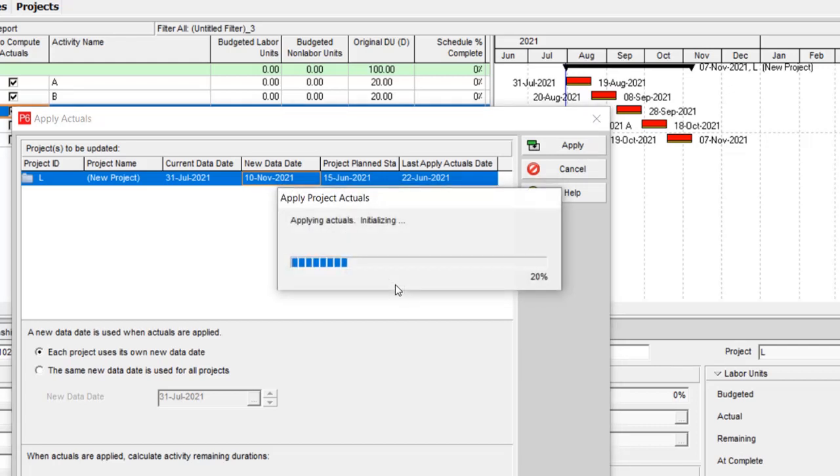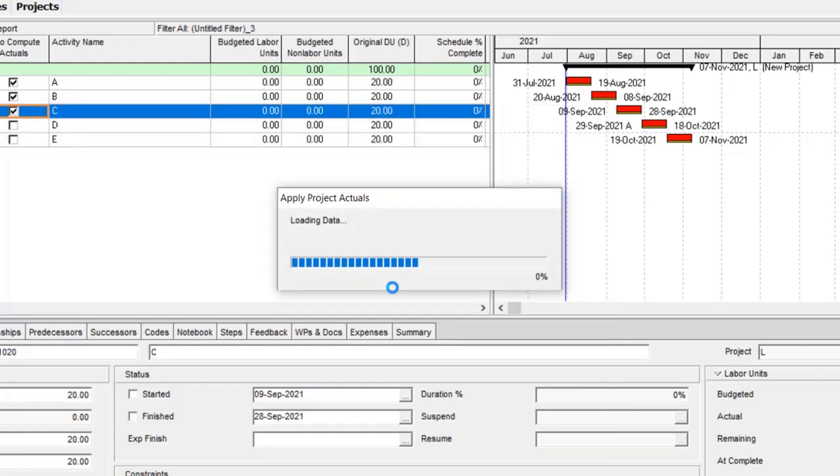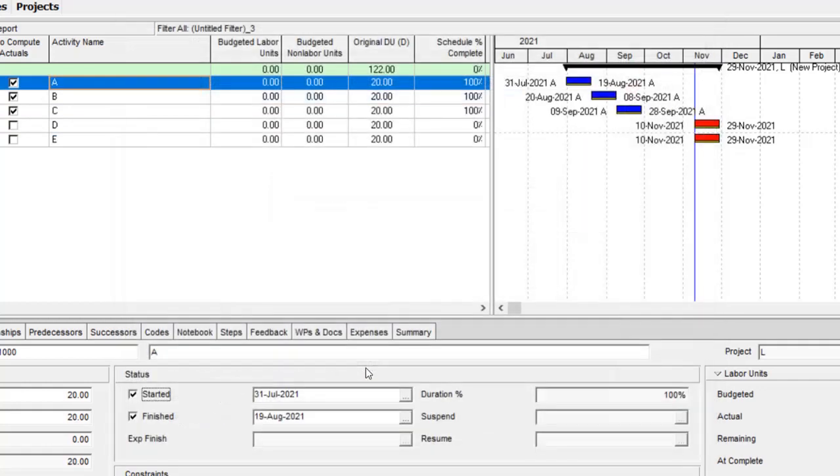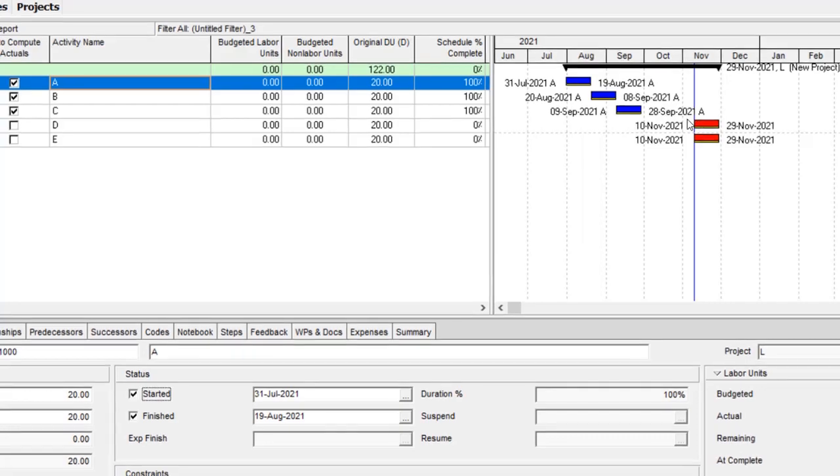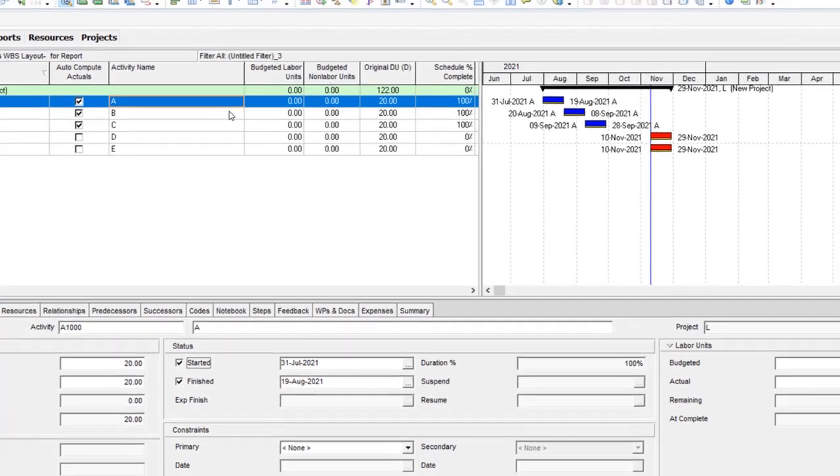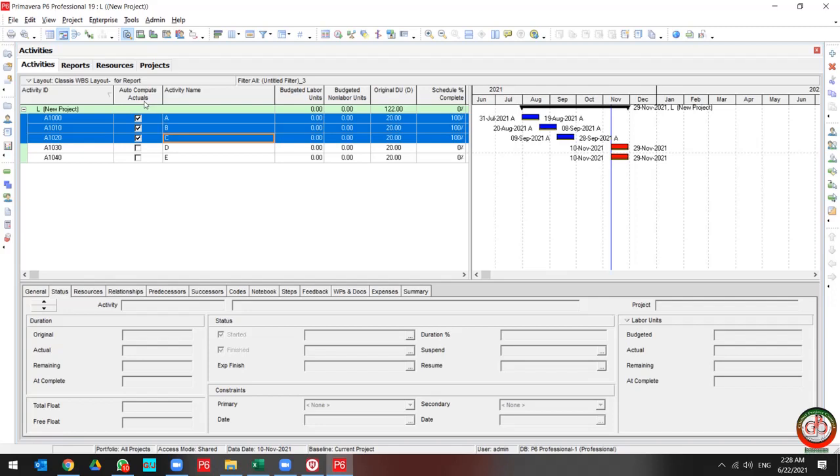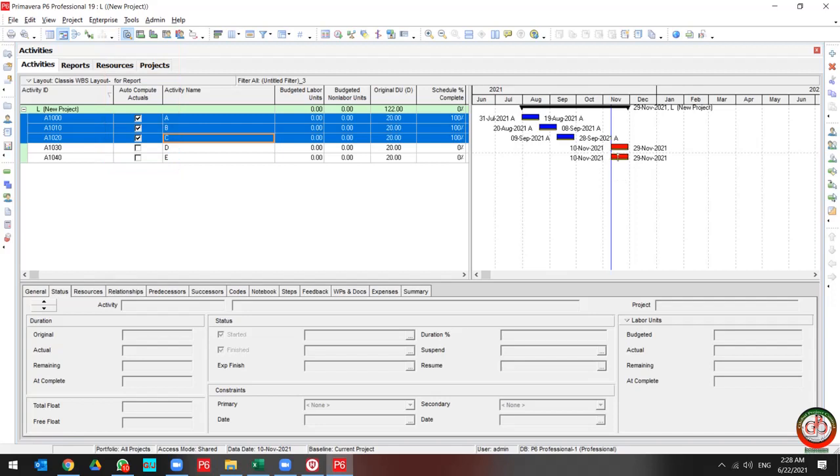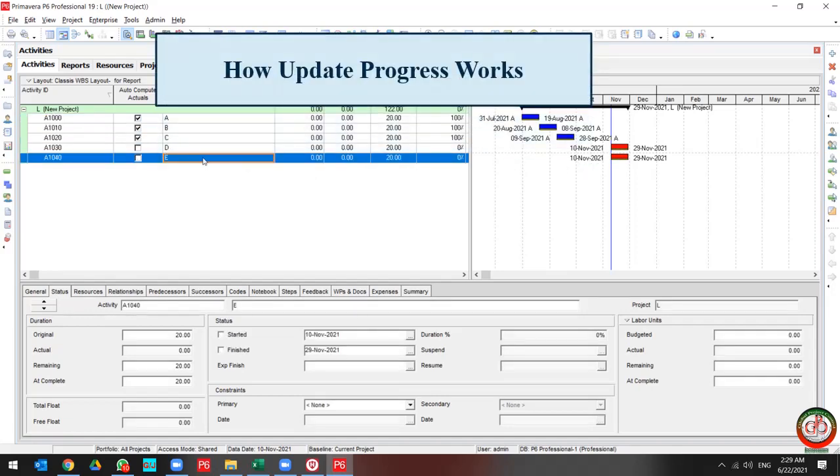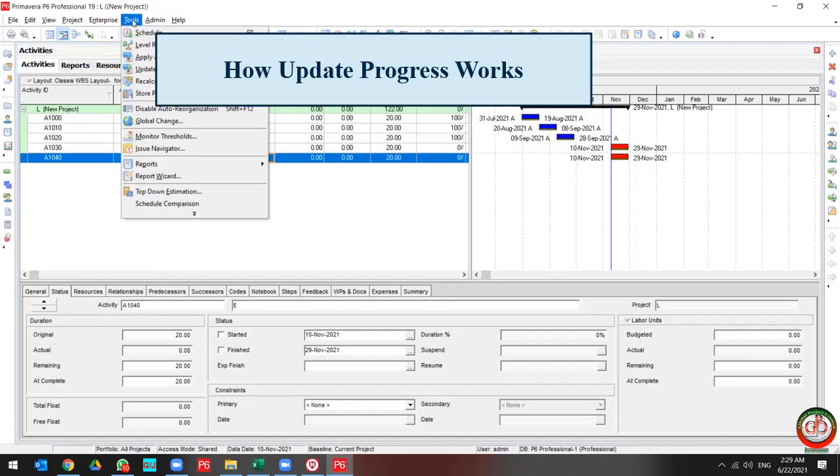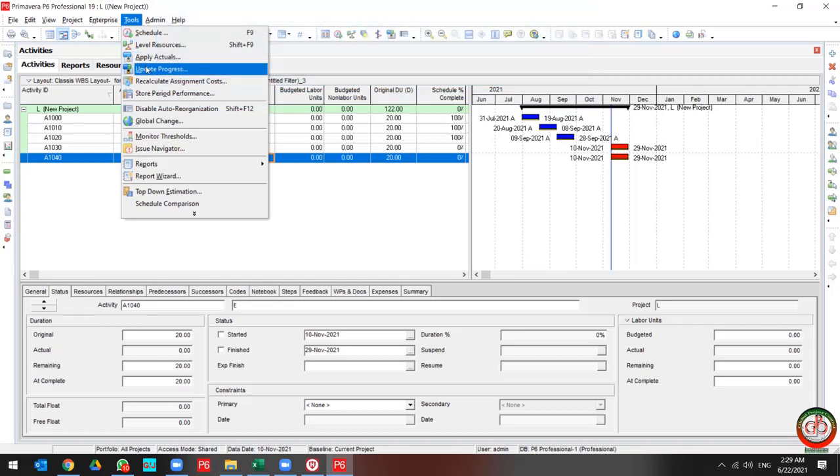It's going to take a little time. That's it. Apply Actual successfully applied in the project. As you see, the first three activities which selected Autocompute Actual updated successfully according to plan, but the two remaining activities shifted up to 10th of November. But let's find out how other functions work.